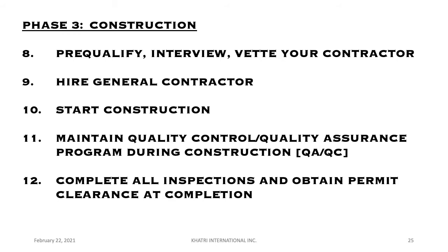Obtain the permit clearances before you complete, and make sure that the contractor does what the plans say he was supposed to do. That's very important, because if you don't do that and they complete the project and it's not done per code, it's not done per the plans, and you pay them, it's very hard to get them to come back and fix that stuff.